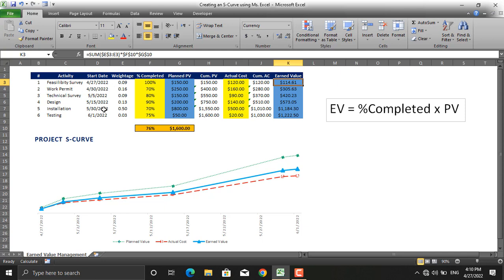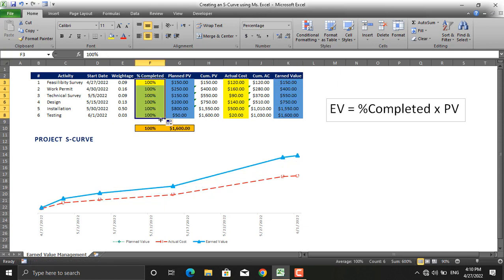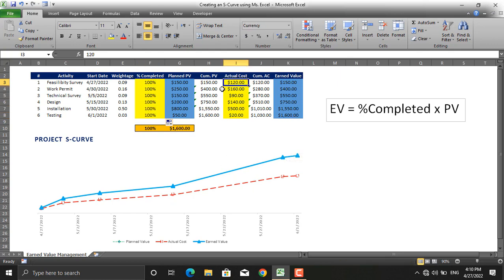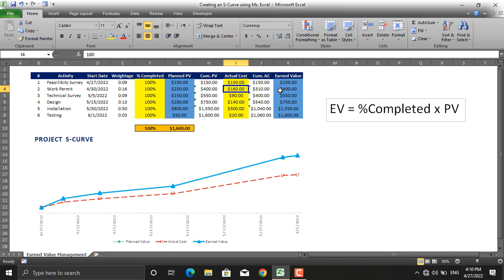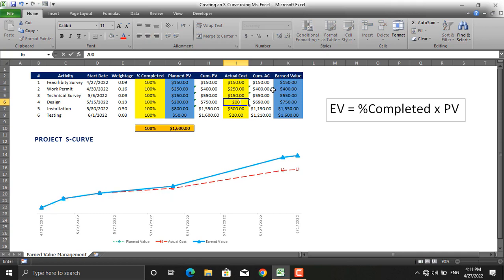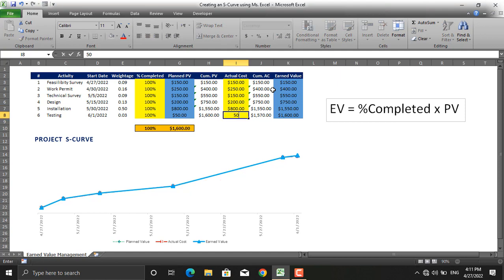Let's make the situation ideal and say that all the activities are 100% complete. This is the earned value. And another thing, the actual costs are equivalent to the planned values. For this value it's 150, for this one it's 250, it's 150, 200, 800, and 50.